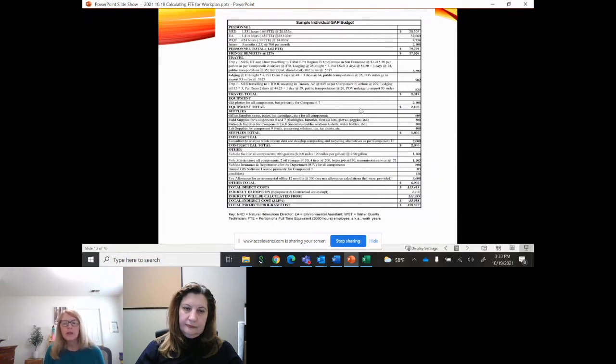You can go back and say, it's because of this, this, this, or this. So that's how we want to make sure you're developing your budget. Your travel costs, we want to make sure those are all included in your work plan commitments in addition to hours. And this is the itemization of I'm going to the Region 9 conference. So here's what I'm estimating the airfare is and the lodging and how many days and per diem is going to be required, or any travel costs for training you're going to take, or RTOC meetings.